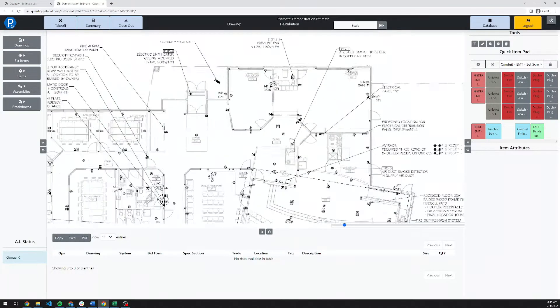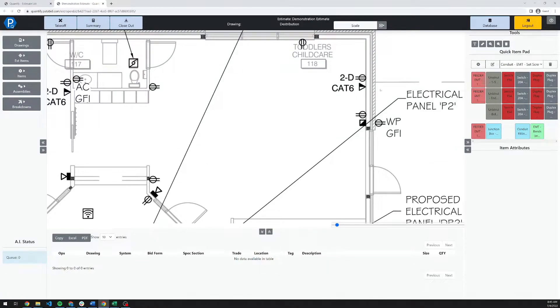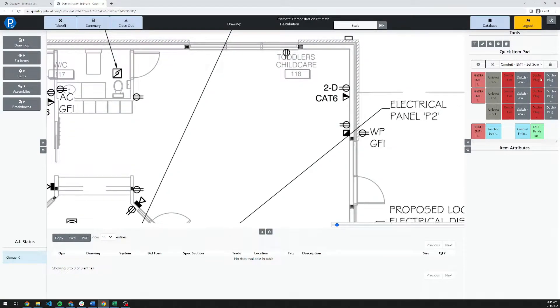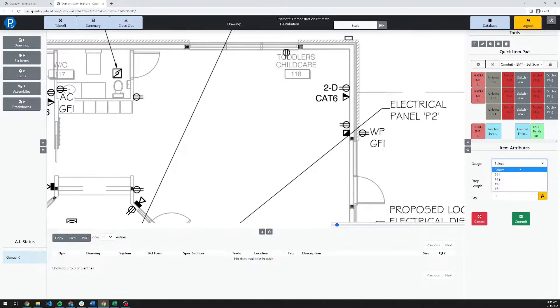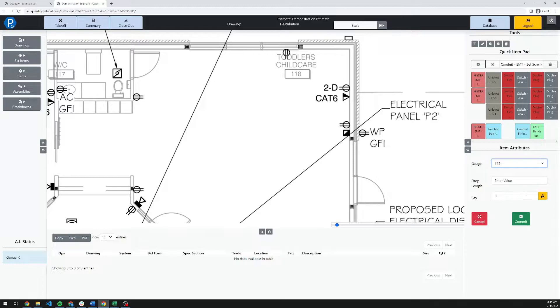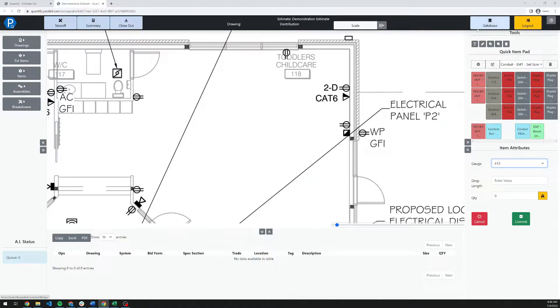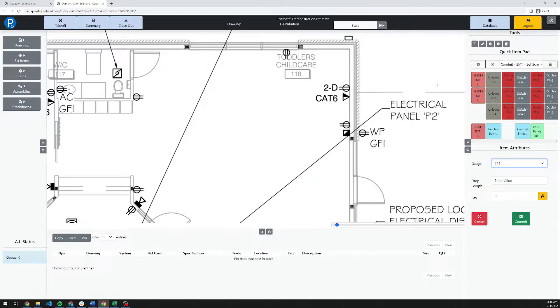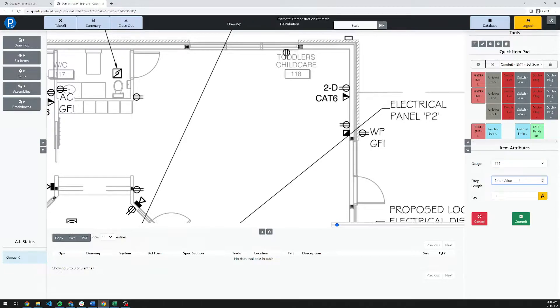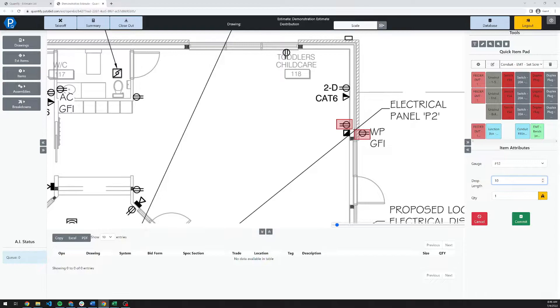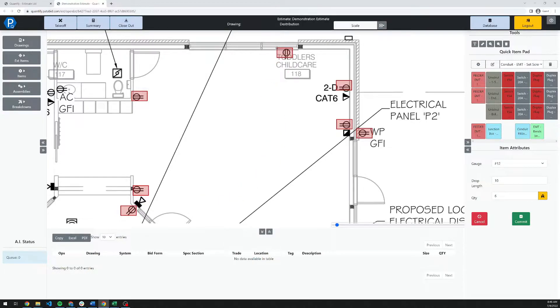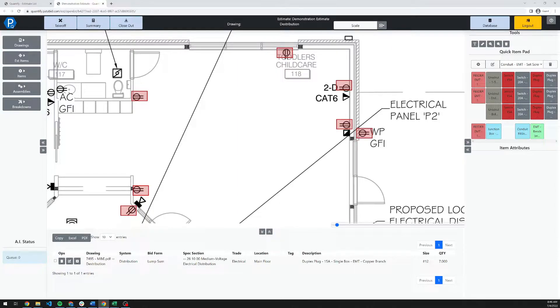Moving into takeoff, there are a couple of methods for performing takeoff in Quantify. I'm going to start with these plugs here. I'm going to click on my quick item pad, select a wire gauge. These are assemblies. All of the assemblies are formula-driven, so they will ask specific questions on what you would like for the various options. I'm going to add a 10-foot drop here for this plug. I'm going to start counting these. Very quick, you can start to take off items on the drawings. Then I'm going to right-click to complete that.